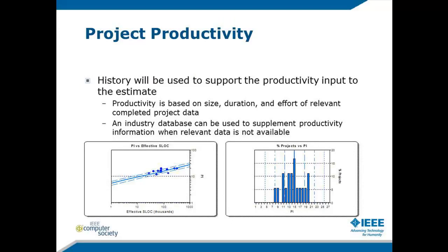And we really want to figure out how efficient is the team and how good is the environment that we're working in. We're going to figure out these productivity measures based on historical data. We're going to take information from projects that have been completed and take into account how big they were, size, functionality-wise, and we're going to also take into account the duration of the effort so that we can measure our productivity.